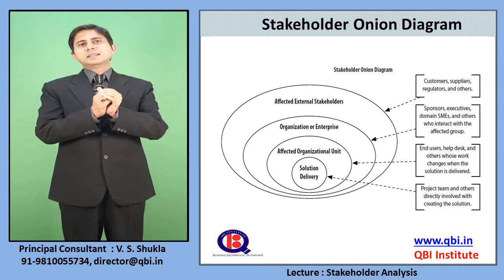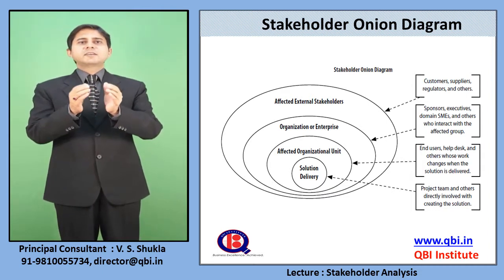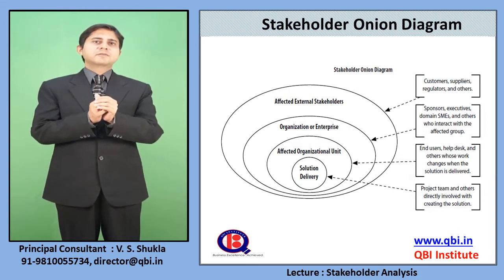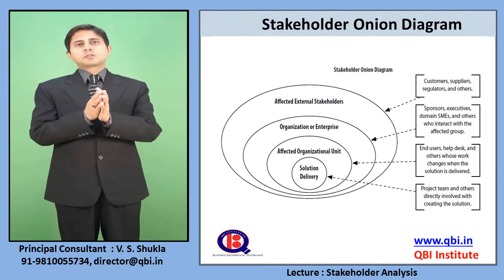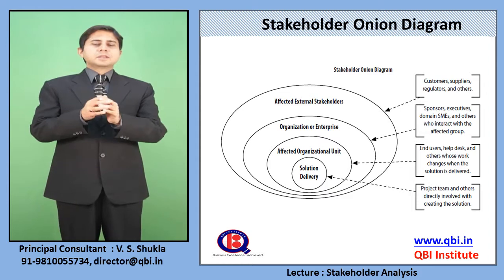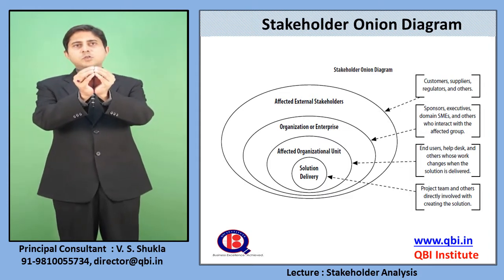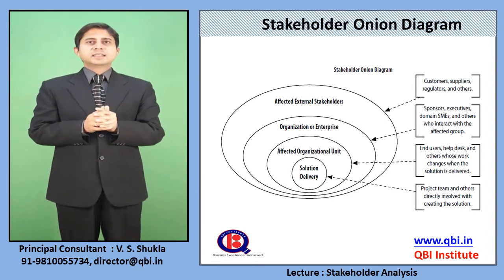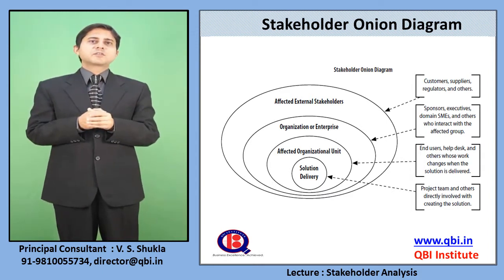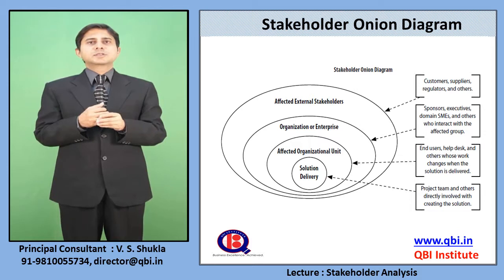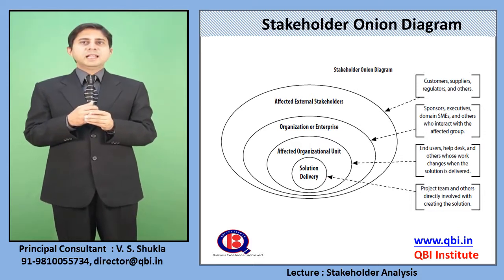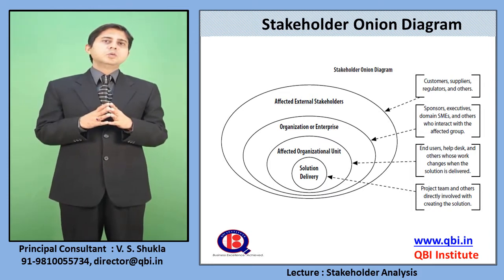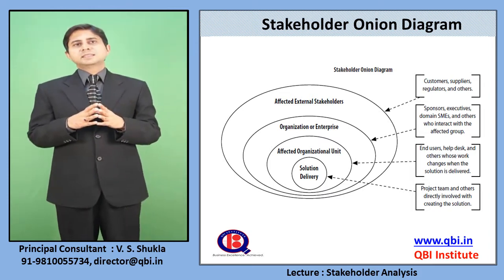Here I will clarify that even the development team, the testers, the implementers, the business analyst himself is a stakeholder on the project. Then after the innermost core of solution delivery comes the affected organization unit. That is the organization unit for which you are implementing the solution. So here are end users, help desk and others who are in the department who will get affected by this change.